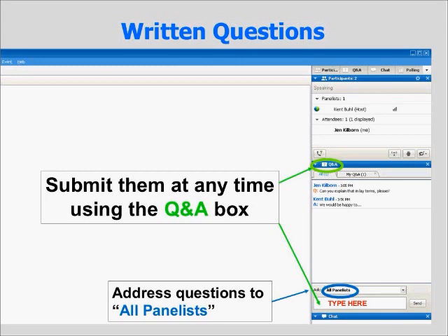One thing that I didn't cover, like, why would you want to do a categorical exclusion? Well, if you do a categorical exclusion and you go through all those items on the statutory checklist and everything is clean, there's no items that require compliance with any of these applicable authorities. For instance, you're not in a floodplain, you're not affecting a historic resource, you may magically, this is pure magic, convert to exempt and not have to publish any notices or request the release of funds. So I was trying to stay away from that to keep it simple, but...